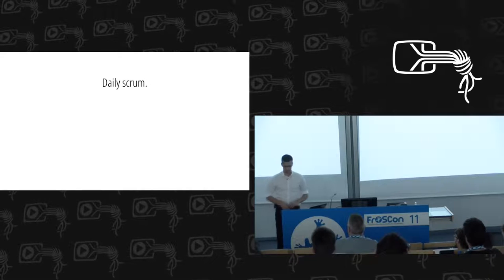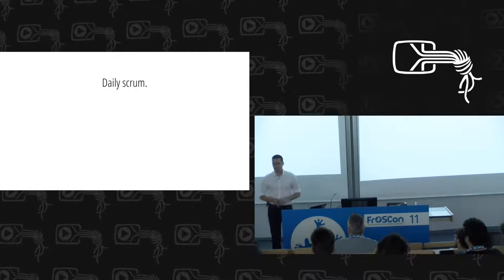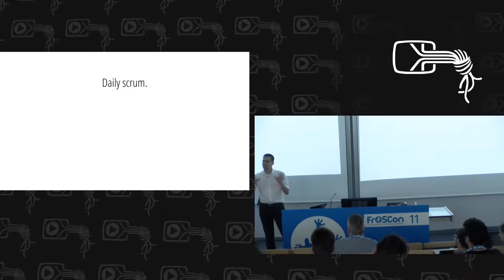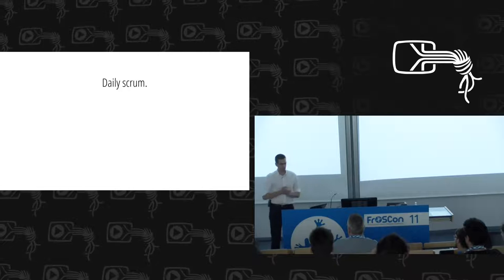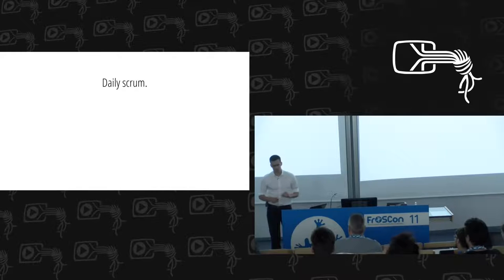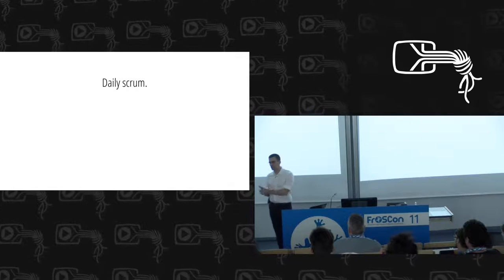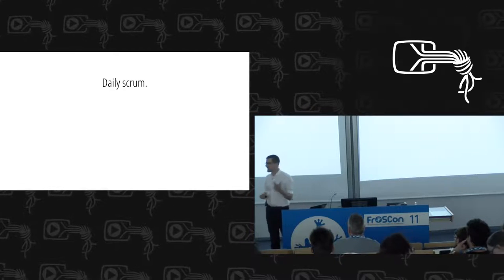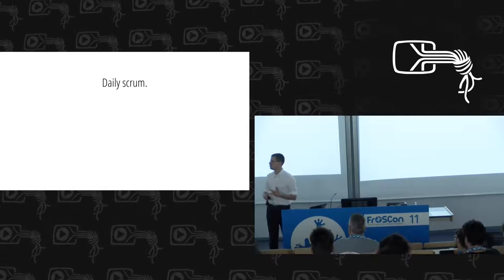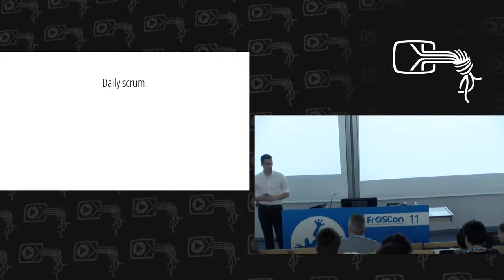The daily Scrum is an immutable event defined as a time-boxed event of exactly 15 minutes. It involves the entire development team, and every member answers three questions: one, what did I do yesterday to help my team achieve the sprint goals? Two, what am I doing today to help the team achieve the sprint goals? And three, what obstacles are impeding myself or the rest of the team from making progress?